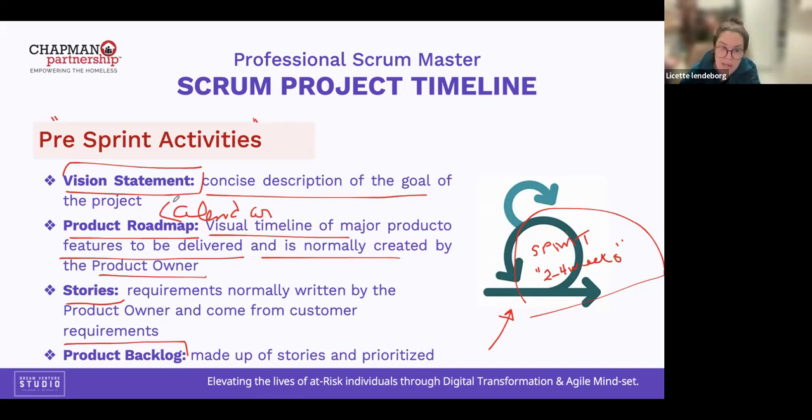Like an estimated calendar. Because remember that when we start executing the tasks and the user stories, we will be able to define the team velocity. And by that time, eventually, we will know how many story points we will be able to complete in each sprint. The stories are the requirements in a beautiful language.